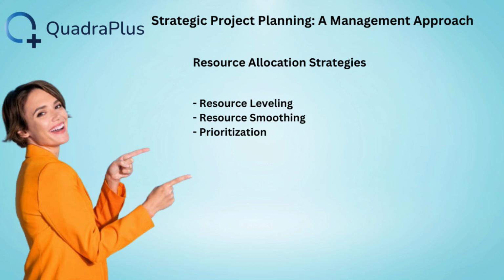When to use resource leveling. When resources are overallocated and cannot handle multiple tasks simultaneously. When the project schedule can be adjusted without harming final deadlines. When workload balancing is necessary to prevent burnout.